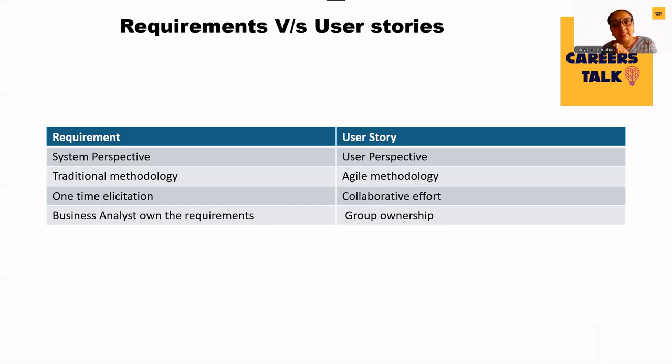First, we're going to take only the sign in or the sign up. Okay, first sign up in this sprint. Sprint can be 1 week, 2 weeks, or 3 weeks, depending on the project again. And in that sprint, there will be developers, testers, deployment engineers, product owner, and a Scrum Master. So it is a collaborative effort.